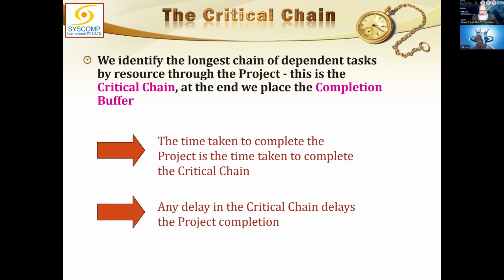If you can somehow tax all your critical activities to give a contribution for the project manager's disposal, some time should be reserved with the project manager and taken out from the activities, and that should act as a project buffer.